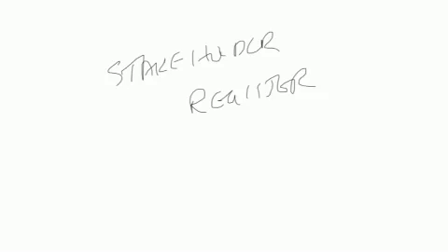And once the stakeholders are identified, the next step is classifying the stakeholders based on their interest in the project and the power of the stakeholders to influence the project.